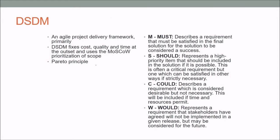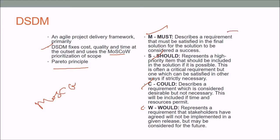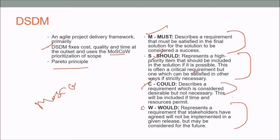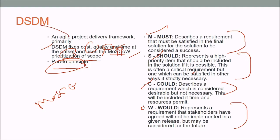DSDM — Dynamic Systems Development Method — is an agile project delivery framework that fixes cost, quality, and time at the outset, and uses MoSCoW prioritization of scope. It follows the Pareto principle. MoSCoW stands for: Must (requirements that must be satisfied for success), Should (high-priority items to include if possible), Could (desirable but not necessary requirements), and Would (requirements agreed not to be implemented in this release but considered for the future).